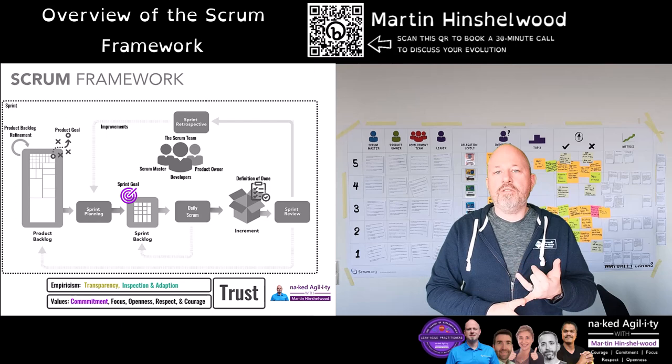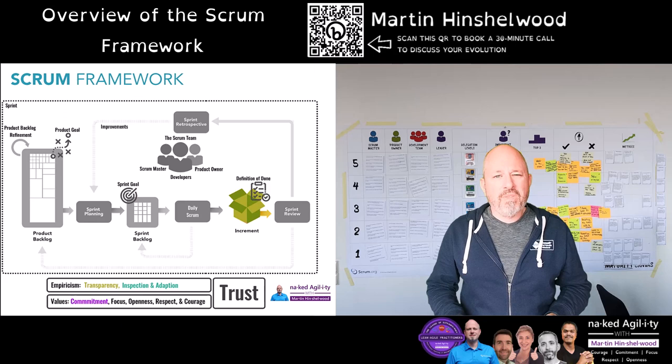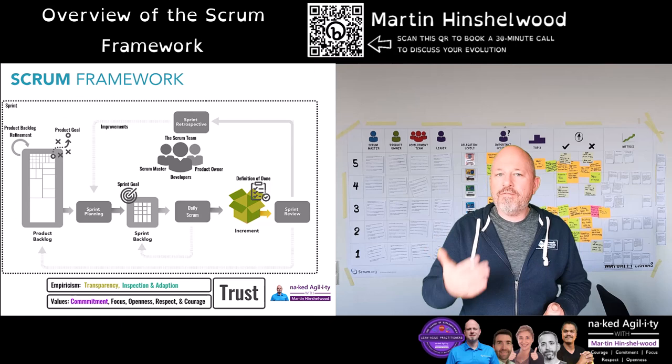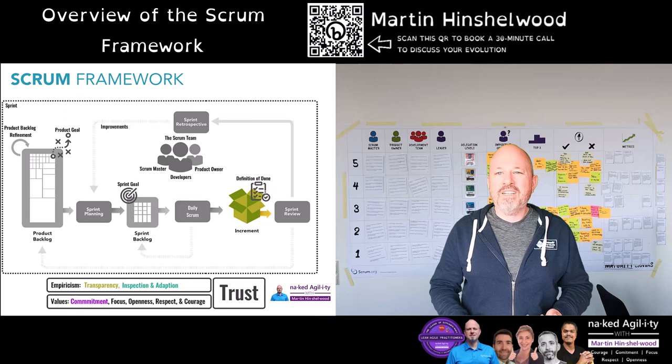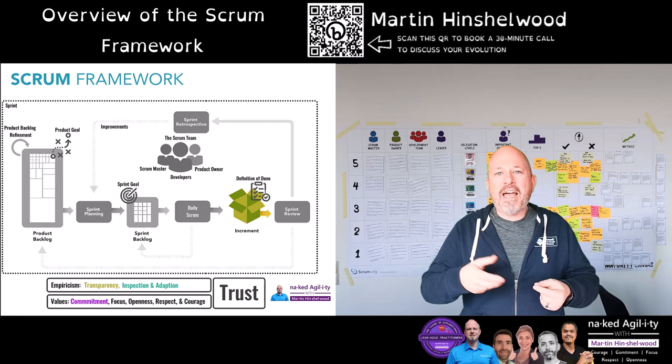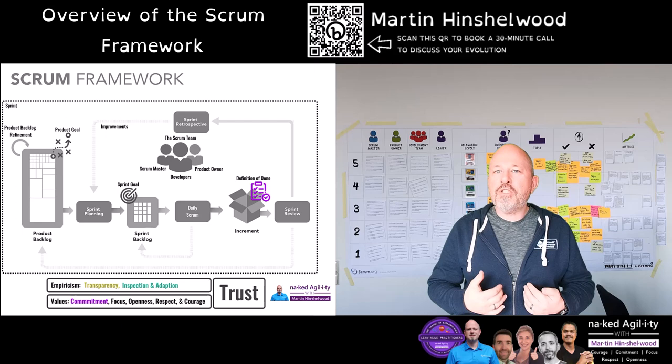Lastly, we have the product increment. Representing the entire product, it provides transparency over what we have done — transparency of the past. Each consecutive increment is a concrete step towards the product goal and must be usable. Usable is a combination of backlog items themselves and the quality measures that represent completeness. The formal description of those quality measures is the definition of done.